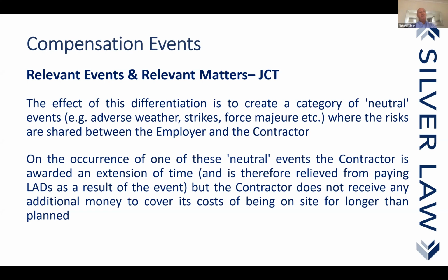We are carrying out works on a contract where it is a refurbishment project. And we've got major works internally and minor works externally. And the minor works, let's say, are just pointing. And they are not on the critical path. And there is a set quantity of pointing works. And lo and behold, the employer under a JCT instructs a whole load of additional pointing, and in areas that were not covered before, and which involve quite a lot of loss and expense.